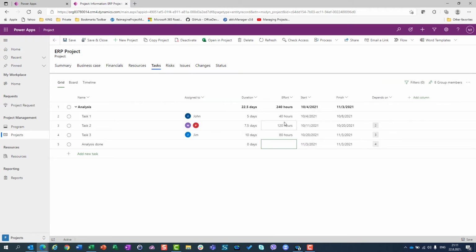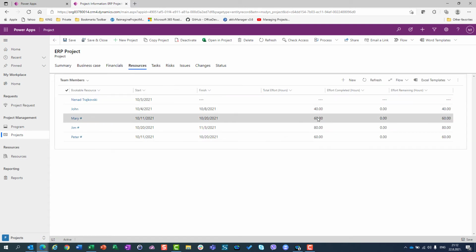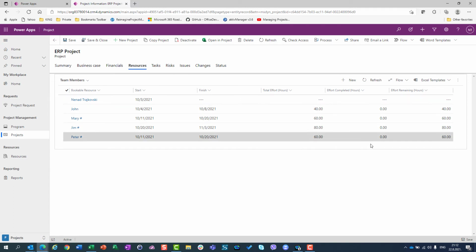So you can see John 40, Jim 80, and Mary and Peter 60 hours each. Here it is. 40, 60, 80, 60. Everything is done. Effort completed 0. Why? Because we didn't start with the project yet.